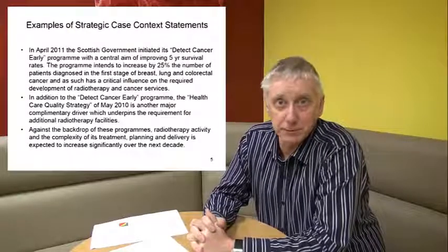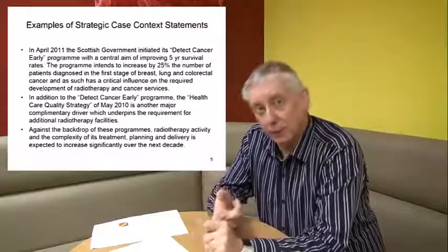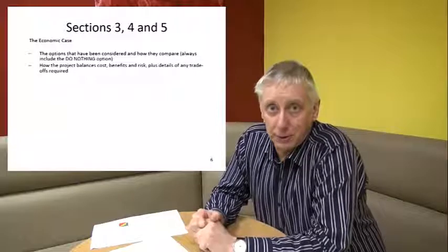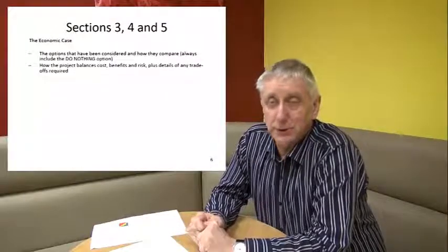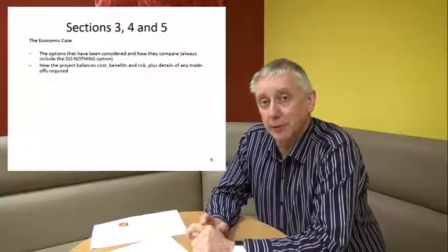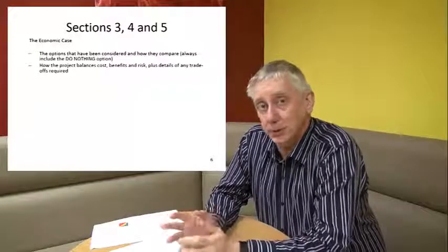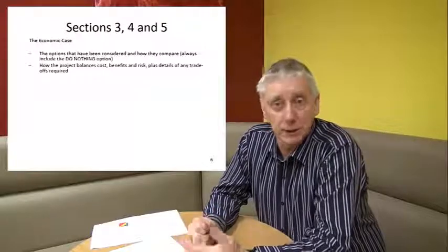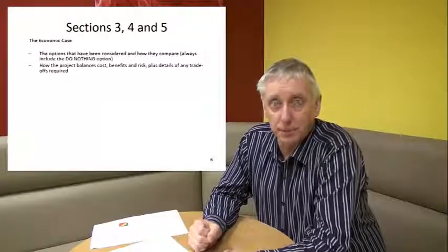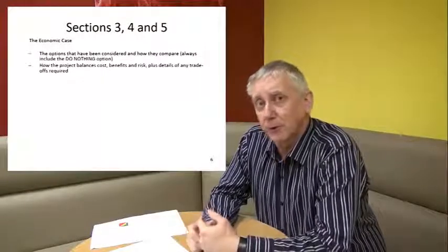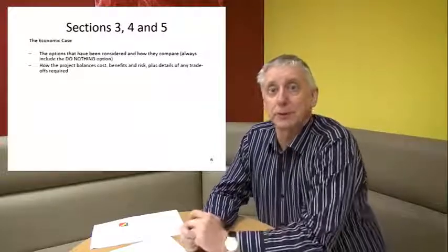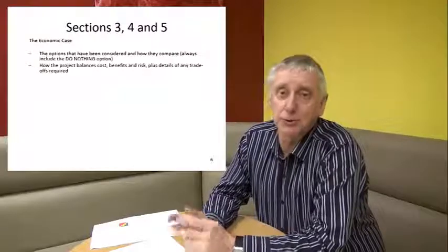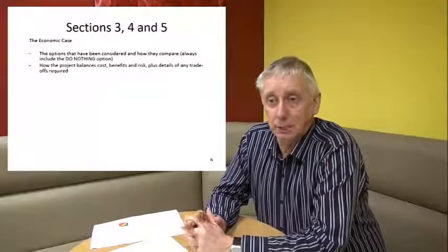The third section, so far we've covered the summary and the strategic case. The third section will be the economic case. In other words, this is where you start to lay out in detail the various options that you have considered in how you're going to move this idea forward. And it's at this point that a tool called option appraisal comes into play. Later on in the presentation, I'll give you a slide which shows what an option appraisal template looks like.